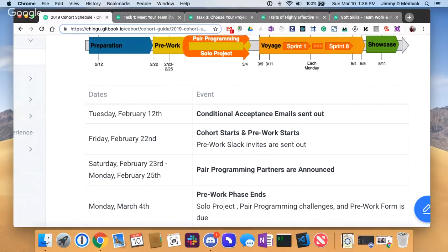So in sprint zero, I would define that. And at the end of sprint zero, I would have that broken down into a backlog of tasks for sprint one. That's basically, here are the things that you need to do in sprint one to have some type of release, however minimal it may be. Again, it may just be the splash page. That's perfectly acceptable.